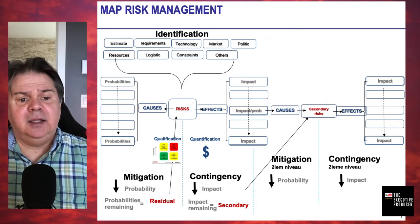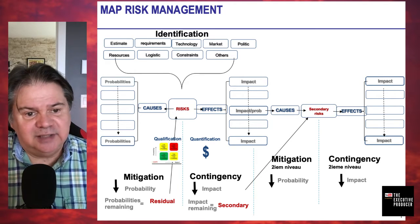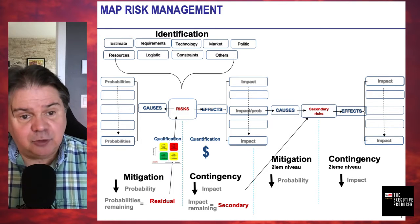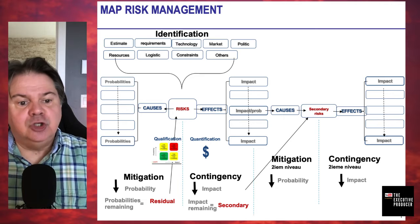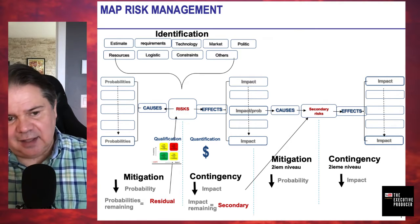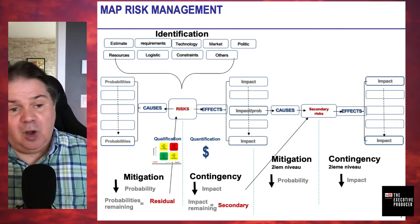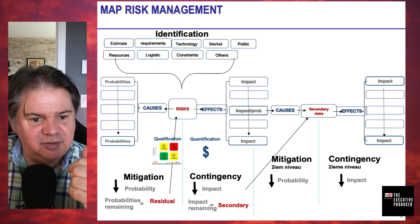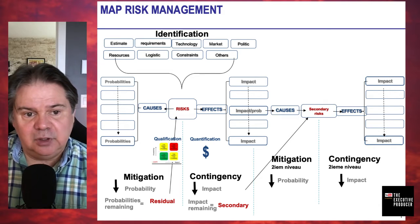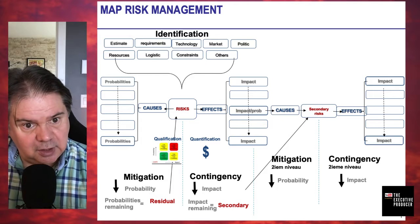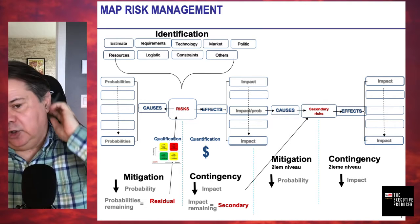The first kind of decision is mitigation — you want to lower the probability of the risk happening. For the battery example: I'm going to test the battery before, or just swap it in advance. Even then, you still have a remaining probability because tackling a cause with certain activities usually doesn't eliminate it 100%. You might take it from high risk to lower risk, but there's still risk remaining — that is what we call residual risk.